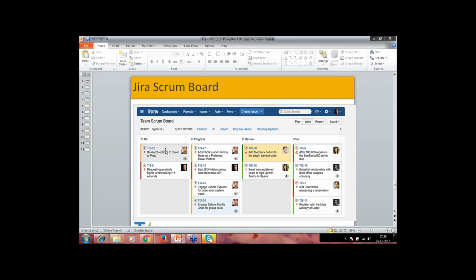as you start working on them, you'll simply move the task from to-do to in progress. For example, there is this task is about 5 hours and this task is about a certain number of hours. So when you move it into in progress, at the end of the day today, when you're leaving the office, you're supposed to go to the task and update how much you have burnt. The task is expected to complete in about 10 hours, and today you have spent about 6 hours. So that 10 hours you have to reduce to 4 hours because you have already burnt 6 hours of the task. So that is how it will go into in progress and you update your task.